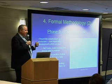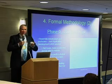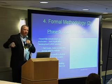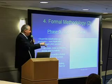And so what you're doing is you're then methodically breaking these things down into small pieces. So it's always easier to estimate small than large, right? Instead of taking the 50,000-foot view, you want to get down to the 500-foot view. And it really depends on how detailed you make that hierarchical outline of all the things you do. But by breaking it down, it's much easier to say, how long will it take me to acquire lumber than to say, how long will it take me to build sets?